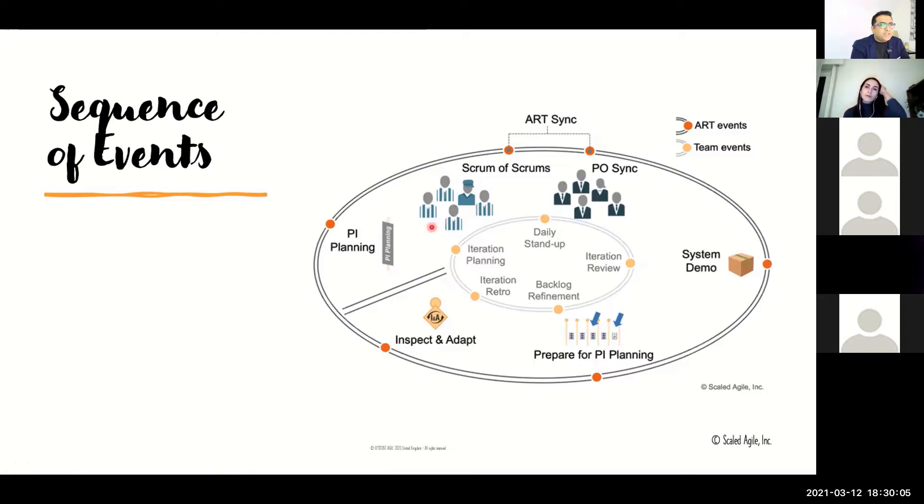Your RTE facilitates the scrum of scrums. Then you've got your PO sync, where all the product owners catch up and discuss any new initiatives, anything that's changed, or anything that's impacting the current PI. They can also start discussing future features and enhancements that need to be done. This PO sync can be facilitated by the RTE and the product manager.